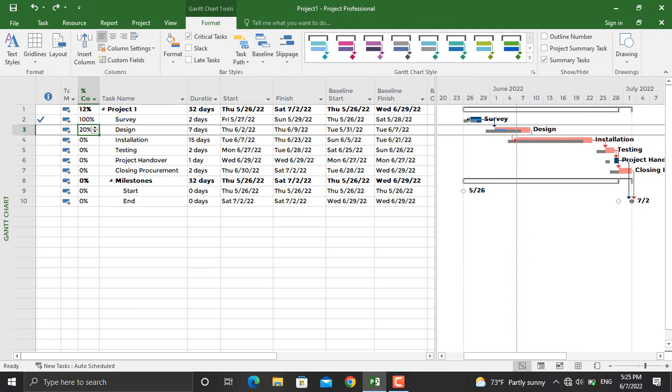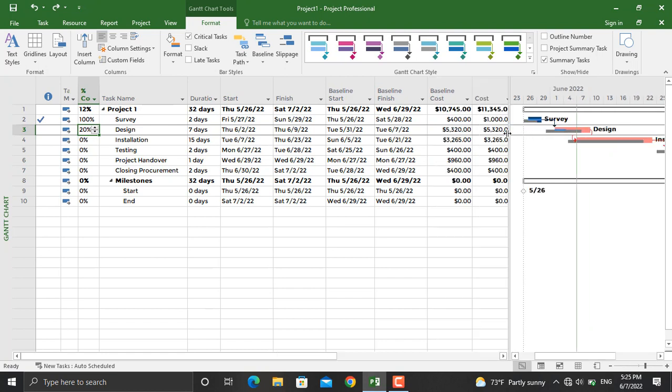The survey moved from May 26th to May 27th. The design moved from May 31st to June 2nd. There were costs planned for each activity; for example, the survey had a baseline cost of $400 and an actual cost of $1,000.